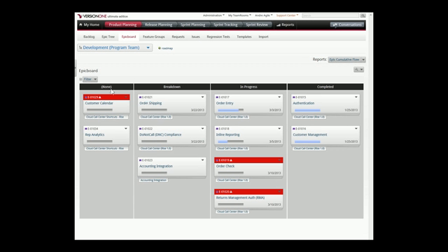From a resource perspective, kind of at the higher program level, the focus there is really around making sure you understand how much capacity do I have release over release. So within release scheduling, if I have a consistent team and I go in and look at my call center team, I'm able to see the amount of estimate in terms of what we've delivered over time in my releases and make sure that I'm not overcommitting the team that's available to do the work for that particular area.